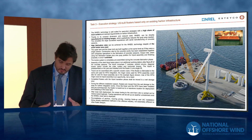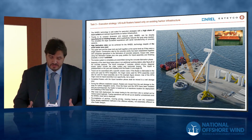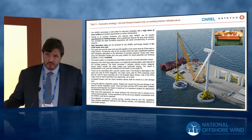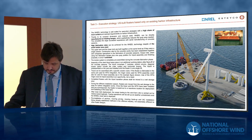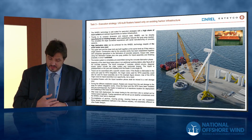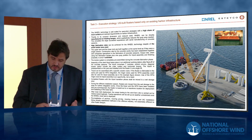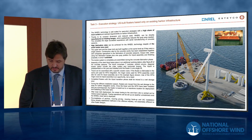This, well, in our case, although we have aimed for a configuration that is, let's say, emulating caissons in the sense that it's formed by flat slabs and vertical walls that can be either with climbing formwork or sliding formwork, and this is quite effective and low cost. But still, there are more complexities. We do have some ballasting system. We do have some pre-stressing to make sure that the tanks will be fully watertight, and this means that we are not going as fast as caissons, but with 2 barges or a barge that is double, we can take 2 weeks, therefore delivering a construction rate of around 1 unit per week.